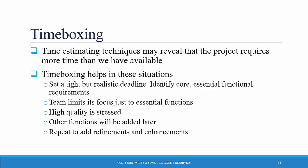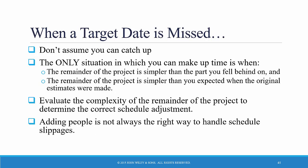There's a trade-off: you'll deliver the system on time, which is a rarity, but it won't do everything you thought it would to begin with. If you miss a target date and have a time overrun, you probably won't catch up. You should not just throw more people at it. You should elongate your estimates for the later phases, steps, and specific tasks, and reduce the complexity — cut some things out, do a little surgery on the scope — so that it's more reasonable and you can deliver on time and within budget. Those are the two goals: on time, in budget.